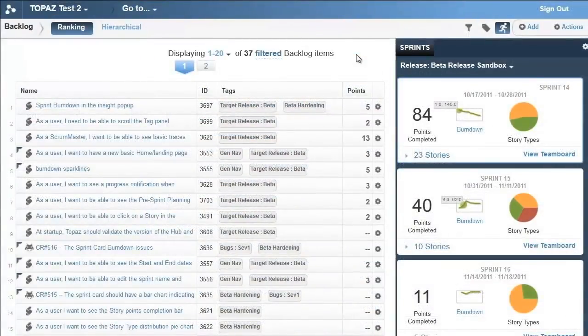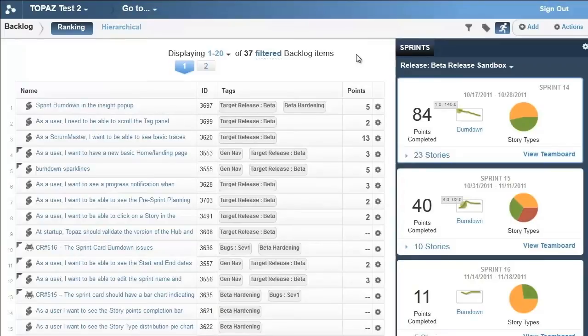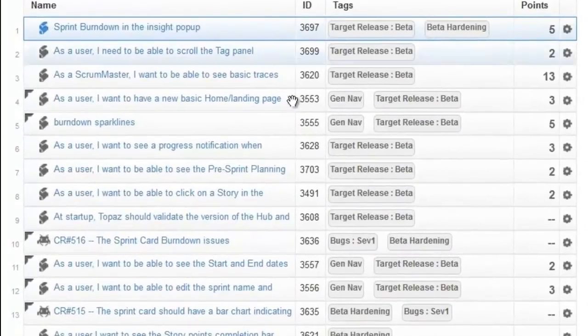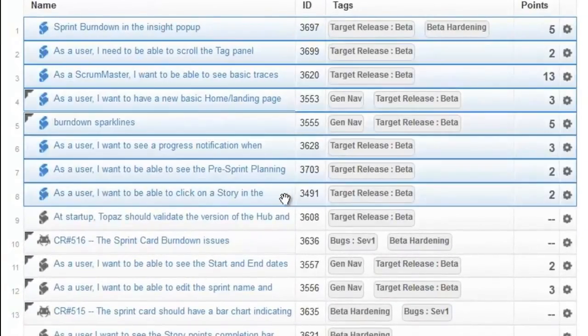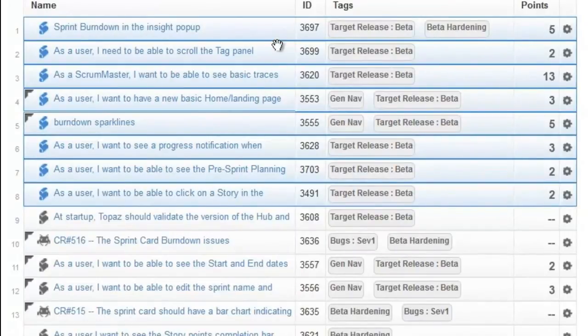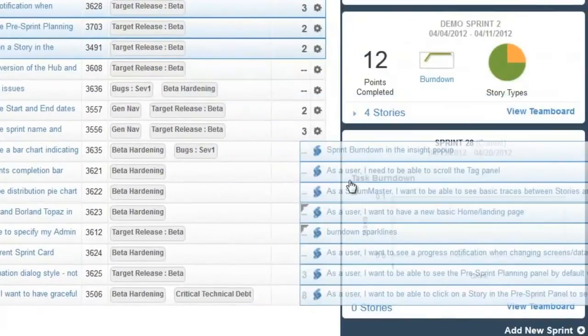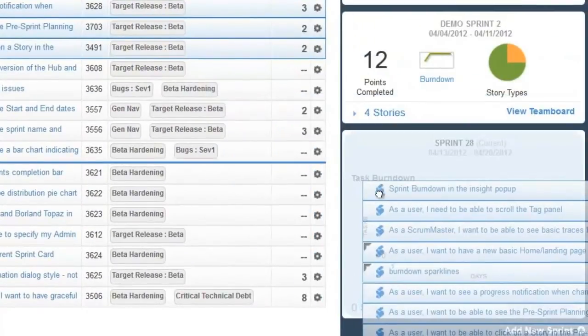With a detailed and prioritized backlog, we are now ready to start planning a sprint. Multiple stories can be selected to match the team's velocity and pulled into the sprint at the same time.